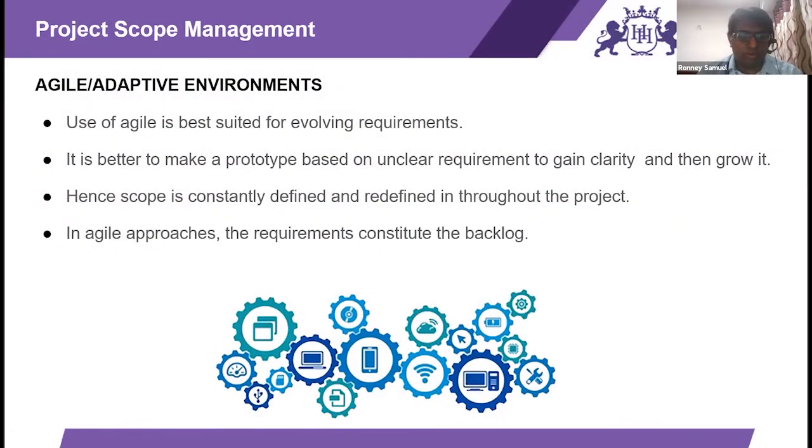Scope of things, what all work we have to complete, is listed in another thing which we call a product backlog. That is under the control of a product owner in Scrum. The sprint backlog is under the control of the team. The team takes the product backlog from the product owner and makes from that the sprint backlog based on the priority given by the product owner. He says, this is my priority and these things are stable, so please work on it.